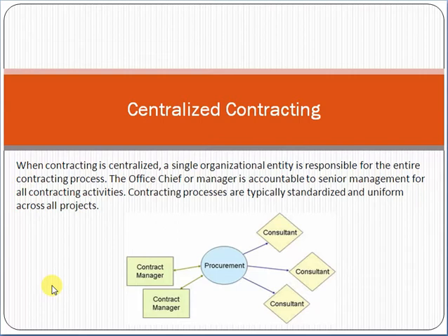So now here, friend, just try to grasp a concept. A centralized division is a separate division. Centralized contracting means the concept of centralized procurement, or a separate procurement department. The procurement department has a procurement manager. They receive the requisition request. Requisition means what needs to be purchased. They get the request from project management and other divisions as well, and they purchase the relevant hardware, not necessarily hardware, sometimes software as well, anything which you need: goods, services, hardware, software. Basically, for the thing which needs to be purchased, you have to give the request to the procurement department, the procurement division. That is called the concept of a centralized division.